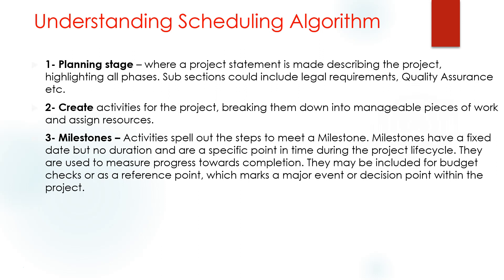Milestones are zero-duration events and represent important events in your project, like when you finish your concrete, complete HVAC, the grand opening, or soft opening — those are all milestones.